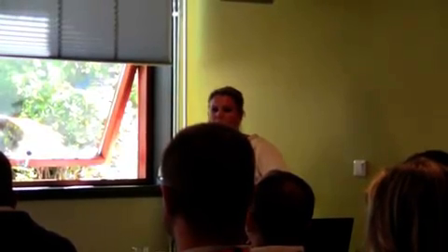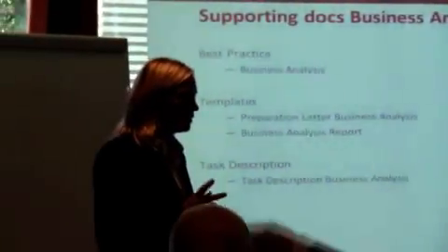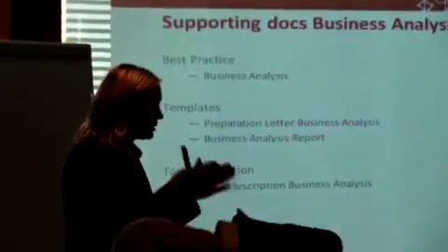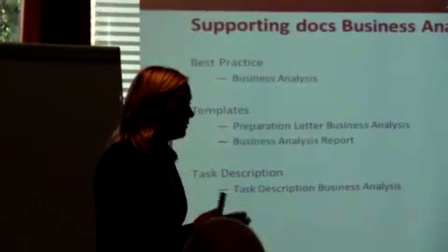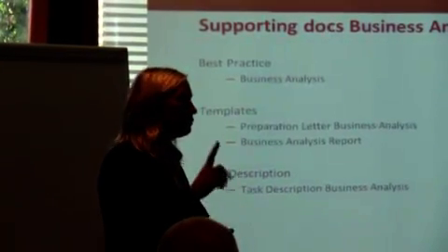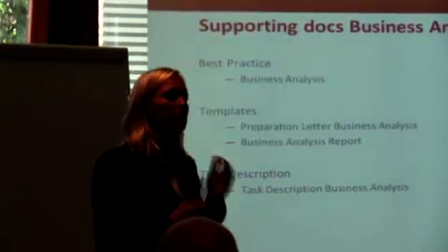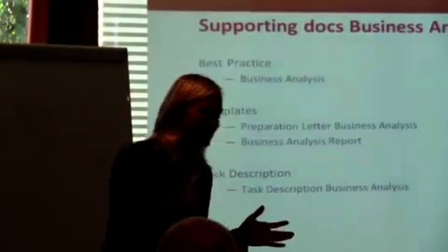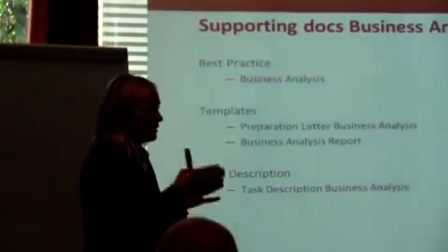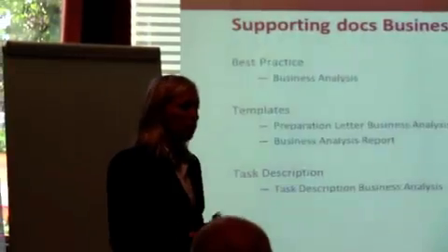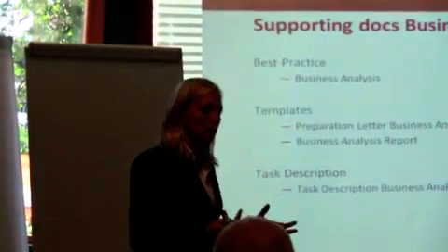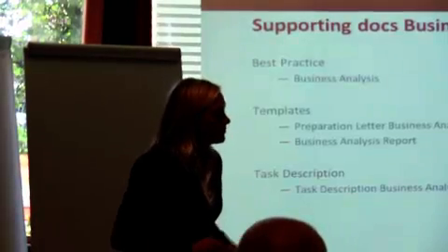It's 4 days. It's 1 day with 2 consultants, and then you document and prepare. This is something that I've learned, because business analysis very much sounds like one activity, and it could be difficult to explain why this takes 4 days. But instead of just calling it business analysis, you can call it business analysis work, as I've done in Swedish, instead of just the actual workshop. It's more of an area that we cover, and it takes 4 days. One of those days is together with the customer, and then there are other things that we also do. So it's also split into preparation and documentation.